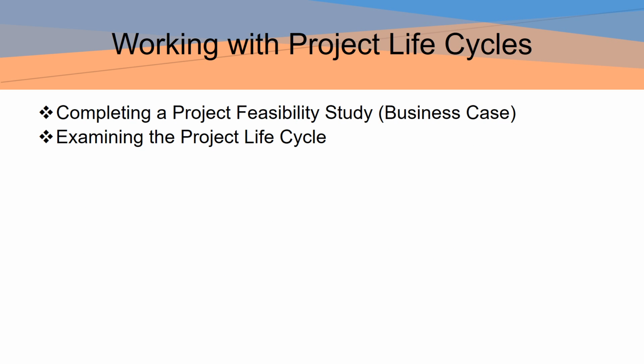By now, you are more than familiar with the concept of a project lifecycle. You also know each project is different and that there are some attributes common across all project lifecycles. For example, the concept of breaking the project apart into manageable phases to move towards completion is typical across most projects. As we have discussed, at the completion of the project phase, an inspection or audit is usually completed. This inspection confirms the project is in alignment with the requirements and expectations of the customer. If the results of the audit or briefing are not in alignment, then rework can happen. New expectations may be formulated, or the project may be killed.